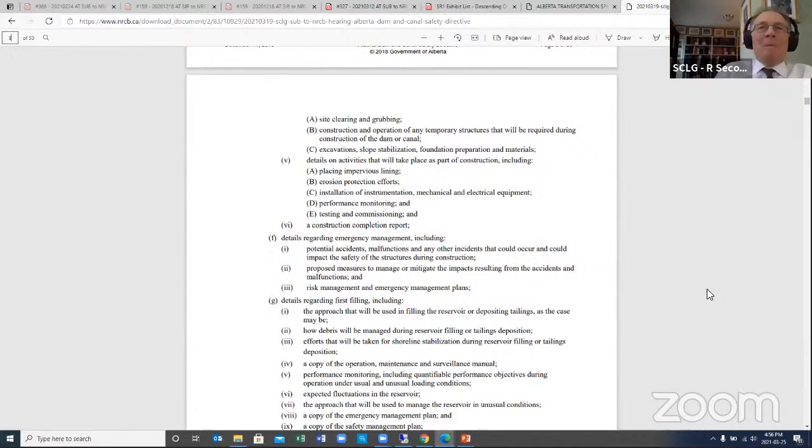Mr. Hebert? Mr. Chairman, Mr. Speller will provide the response on this matter. Mr. Chairman, we're applying through this process to the NRCB for permission to proceed with the project. The authorization to build the project and the acceptance from the dam safety reviewers on the design come through Alberta Environment and Parks and their approvals teams.